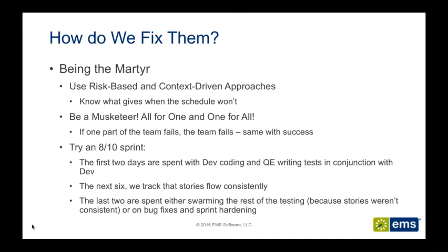And then, I advocate an 8-10 sprint. And so for those of you who have a 10-day sprint, I kind of give a little detail on what this is. So we tend to spend the first 2 days with dev coding and QE writing the tests that are in conjunction with all of the work that is expected to be done, and just kind of doing our last sets of planning and strategizing.